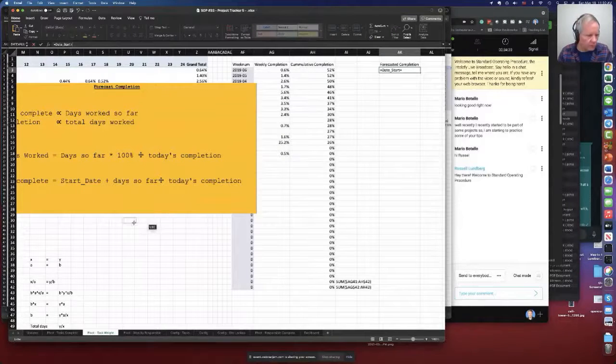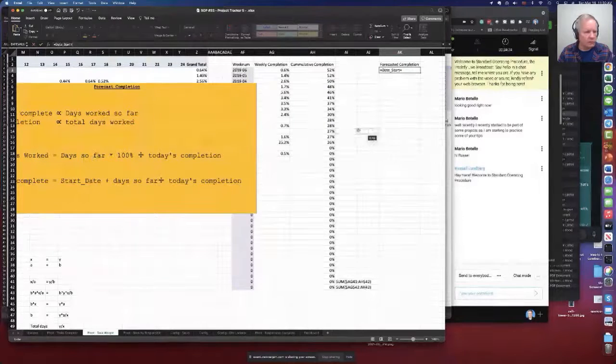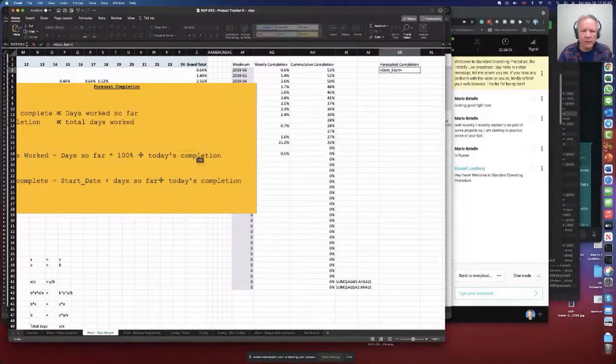And that is date start plus, what did I say? It's the days so far divided by today's completion percentage.